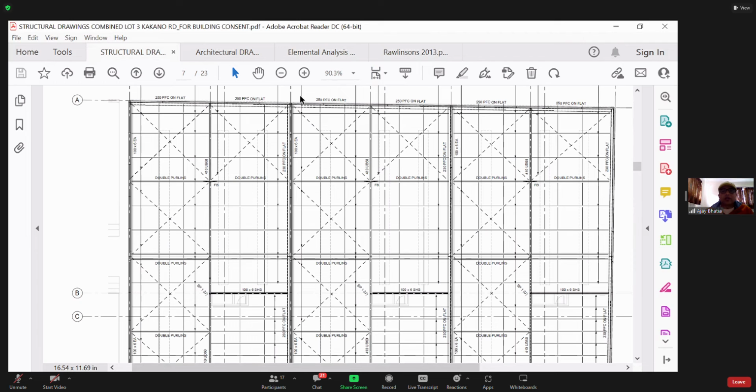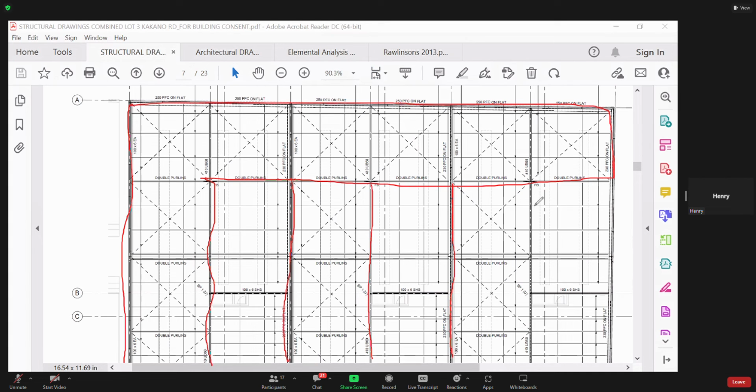You measure this area, this area, and maybe this area, wherever you can see the bracing. You don't have to measure the canopy one. Remember, canopy is not part of your roof in your element 6. So all this area, wherever you can see bracing is happening, measured in square meter, is your measurement for the bracing. That's it.